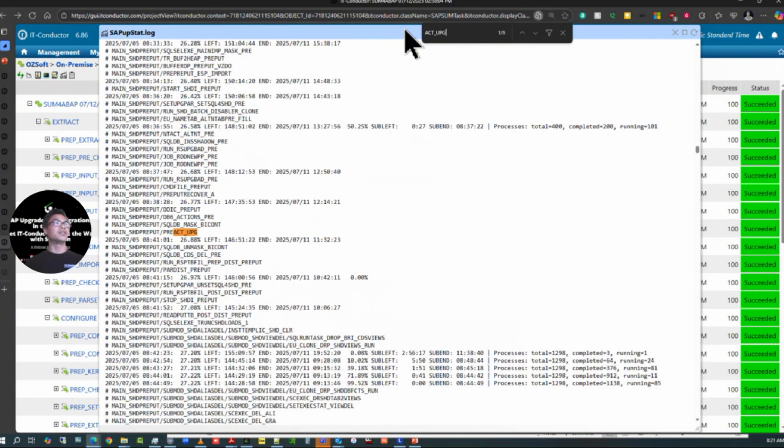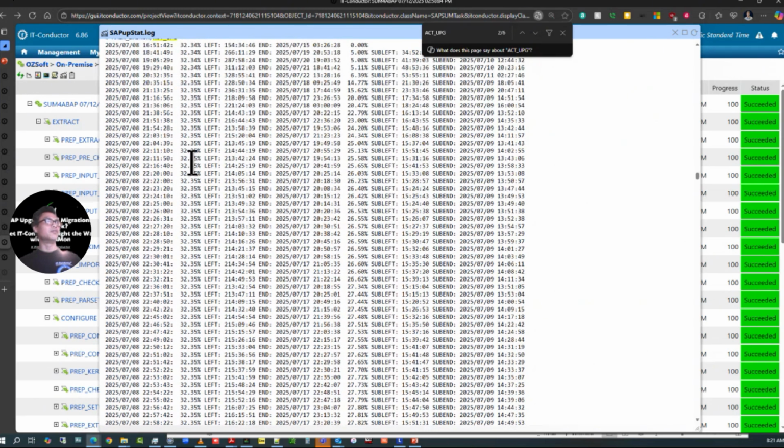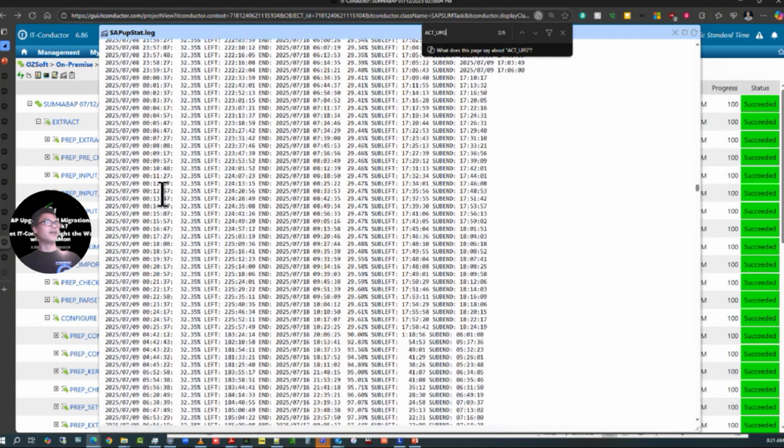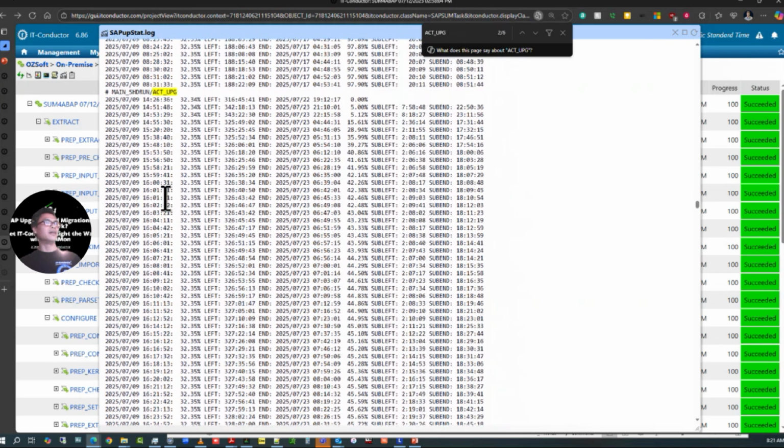Also, when you are building the shadow, now you're activating in the shadow, you've got a phase like this that runs, and literally could be for days. So 7, 8, when it finish? 7, 9 still running. 7, 9, I think went all the way to 7, 10, right? So you have this where it does predict, right? So it tries to predict how much is left. So if you're looking at this, you have a start time, and then what it's predicting to be the projected finish, right?